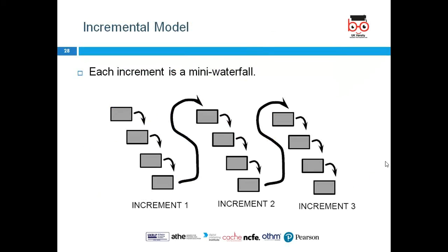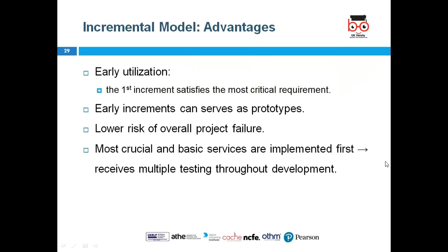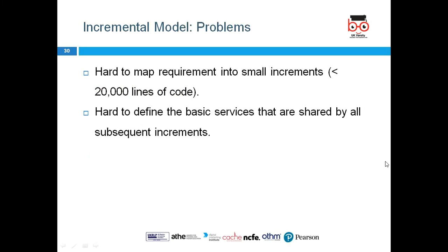Then some advantages of the incremental: early utilization. Early increments can serve as a prototype, lower risk of overall project failure, and the most crucial and basic services are implemented first, and each receives multiple testing throughout development. And then problems: hard to map requirements into small increments.